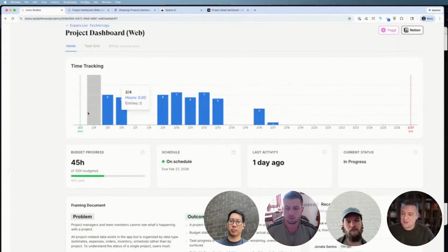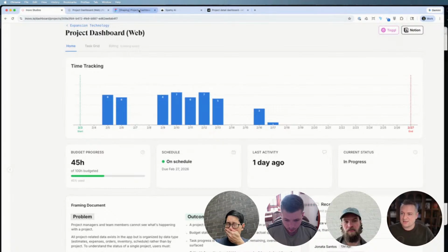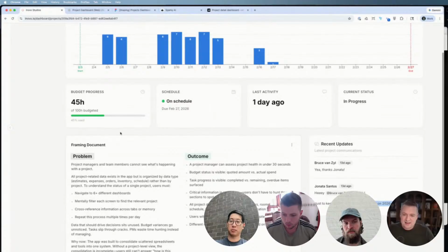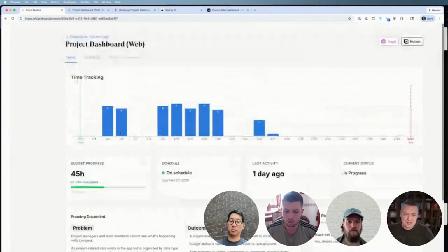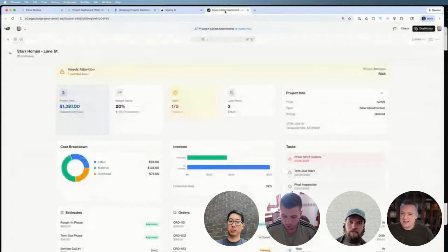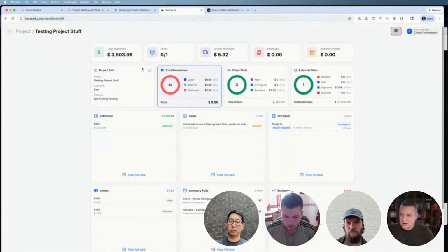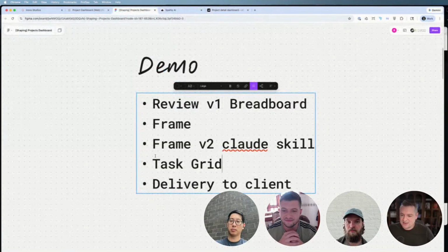And we're doing a lot of things to make sure that this was a very clear project right up front. And I think we cut back a ton of cost with this because we massively simplified the output here, where we just said, let's do everything on one screen. We didn't have all these tabs to worry about, and we can have these little modals that pop up. It made everything smaller because we didn't have to design as much for these little modals versus an entire tab that would take up the entire screen. Little changes, but they actually made a huge difference to the project here. So yeah, very cool.